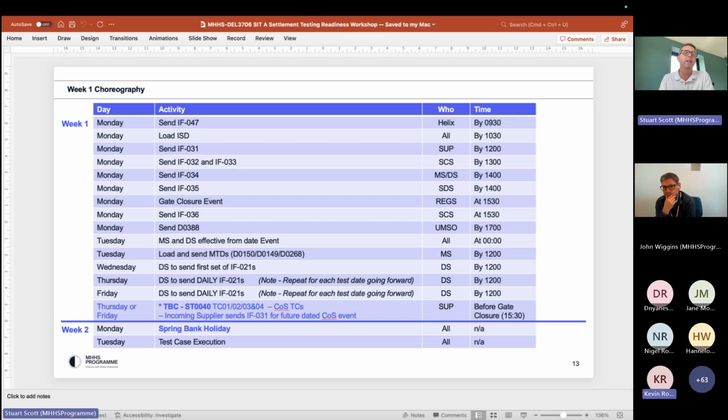Okay, because if we don't get our migrations done, we can't do the stabilization, and if we don't have enough MPANs, we can't run the test cases. Okay, so that's all kind of baked into your thinking. It's just not on this slide. Correct. Ultimately, we're not going to use every one of the 50 test MPANs for all of the test cases we come to. We're probably going to use between 10 and 15, depending on how many, but we also need some for contingency just in case we do end up with data issues. Yeah, okay, understood. Thank you. That's a good question.